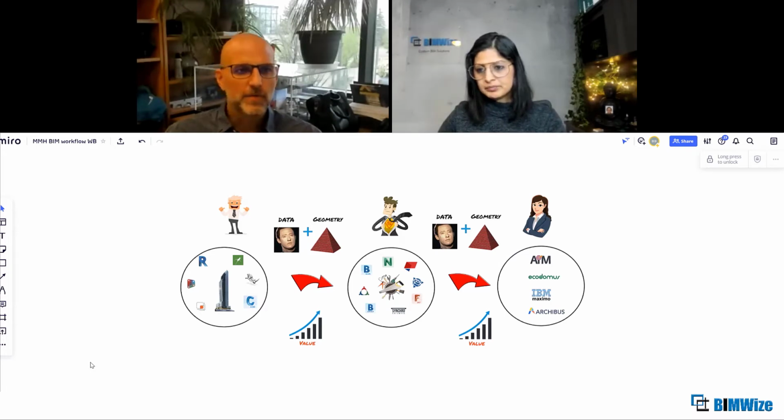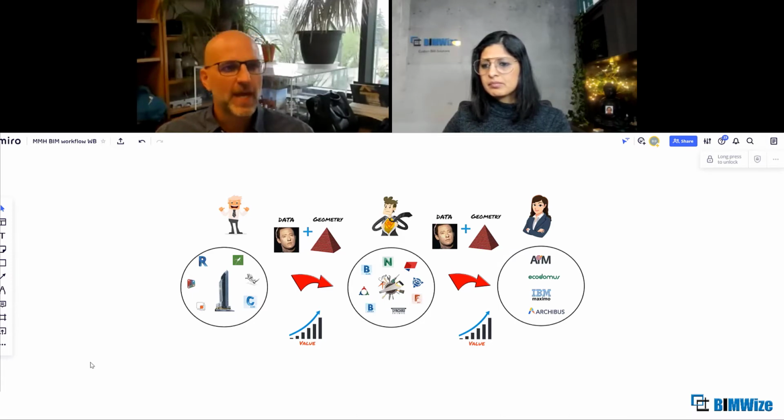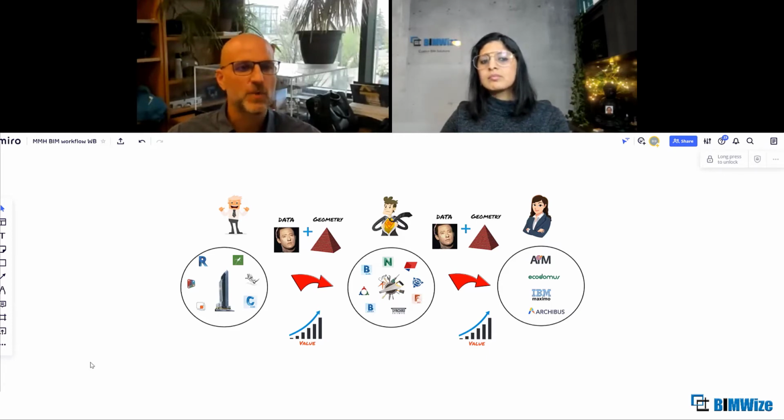Well, I think I would rephrase the question. I think it's less about the handoff and about when the next person needs to be involved. And how much rework is going to be included, because it really depends on the contractual delivery method, because sometimes you are constrained as to where you can stop modeling and hand that off. For example, anything that has low bid, we need a full set of drawings to take to the trade community to price, and that's just what we have to do.